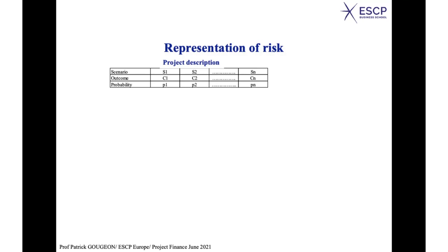A very common practice is to use a model with only three scenarios. You would have the central scenario, the most likely, then the best case, which would lead to the highest level of return for the project, but also what we call the worst case scenario.